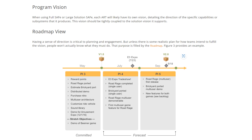You need to have a roadmap view. If you look at that picture, it shows PI 3, PI 4, and PI 5 — what we are trying to achieve in each PI and what milestones we are trying to achieve, such as E3 Expo in July 2023. Having a sense of direction is critical to planning and engagement. Unless there is some realistic plan for how teams intend to fulfill the vision, people won't actually know what they must do.